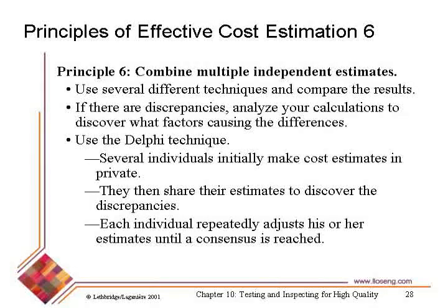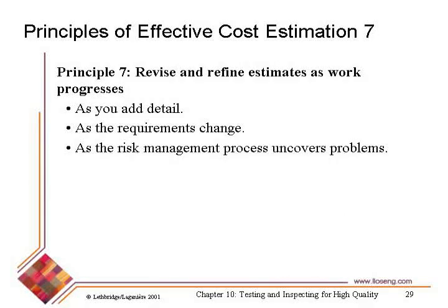You refine and revise estimates as the work progresses. I mentioned that a few minutes ago. You don't just make an estimate and then stick with it. You constantly change. So there has to be some manager's role whose job is basically doing nothing but managing, and a key part of their job is revising the cost estimates, keeping on top of things, understanding what's going well and what's going badly, what new ideas have come up, what changes are coming up, and how they affect the estimates. Update the estimates. If you have a spreadsheet or a project management program, you can do that with tool support very effectively.